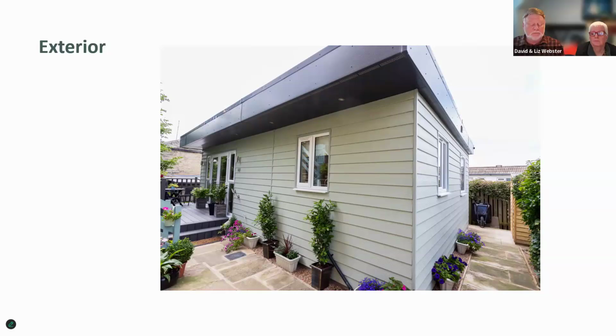Right. And sorry, just a matter of detail, really. So if you're sharing services, digging trenches in, is that part of the standard cost? I mean, a normal part. At what point does it then become, did the 70-meter build actually increase costs? It does, yes. As part of our standard build, we give the first 10 meters of connection to services. That's part of the standard build, David. A very good question to ask.